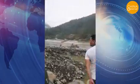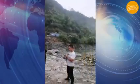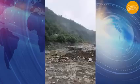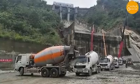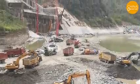According to local media reports, on the afternoon of September 5th, after 4 days of intensive repairs, the washout pit at the bottom of the dam had been filled with welded steel plate and concrete. Construction workers and mechanical equipment were all evacuated by 7:30 p.m. At 8:30 p.m., one of the 3 spillway gates had been opened to discharge floodwater at a flow rate of 30 cubic meters per second.